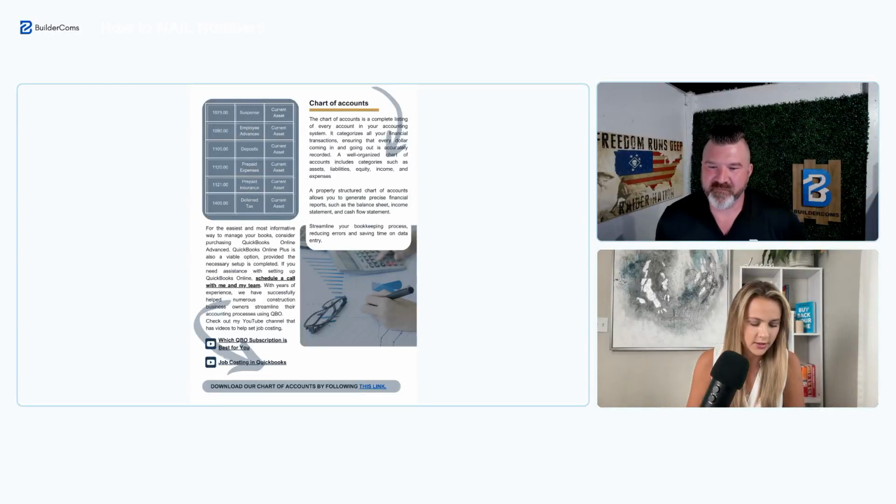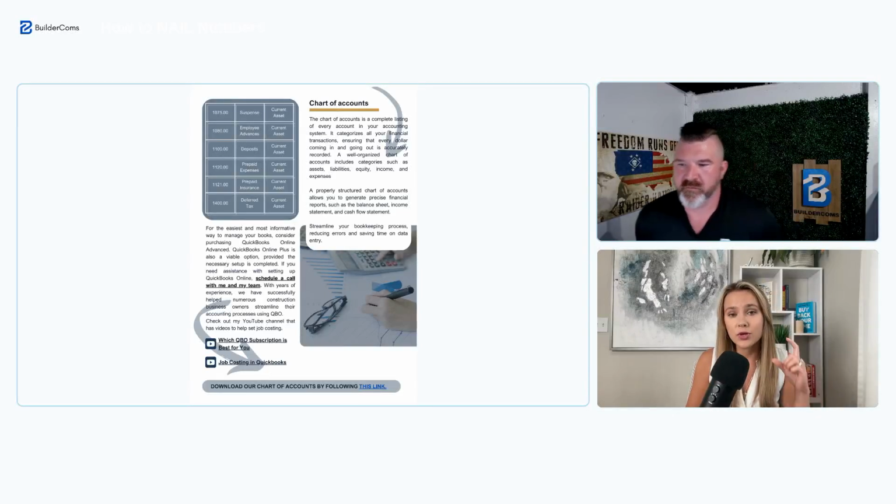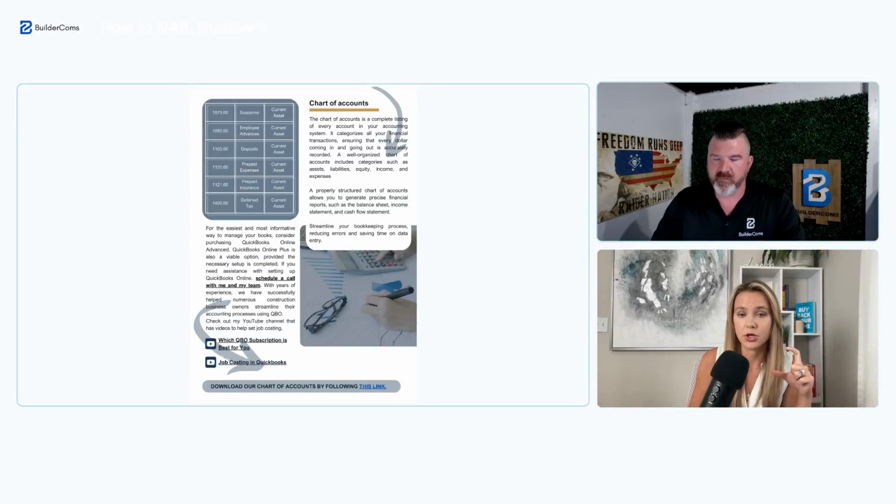And I'm going to share as a bonus one strategy that, if you can do it successfully, is the best thing I've seen happening for cash flow. Most of my clients who are using this strategy never struggle with cash flow. What they do is request a deposit for the project. You can send the bid estimate, but you need to make sure that your contracts are in a very good place, and they outline specifically how change orders and any sort of changes are going to be billed. If you request a deposit for a specific first phase of the project, as you spend that deposit and your bookkeeper is tracking it, when you're done spending that deposit, you are not continuing work until you receive the next deposit. You spend that deposit, you get another one.